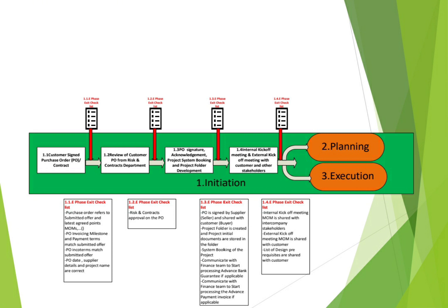delivery of the material. So you will have in your baseline schedule the delivery mentioned as a delivery milestone. For example, we are in May, it will be November 2024. So you need to propose this to your customer.